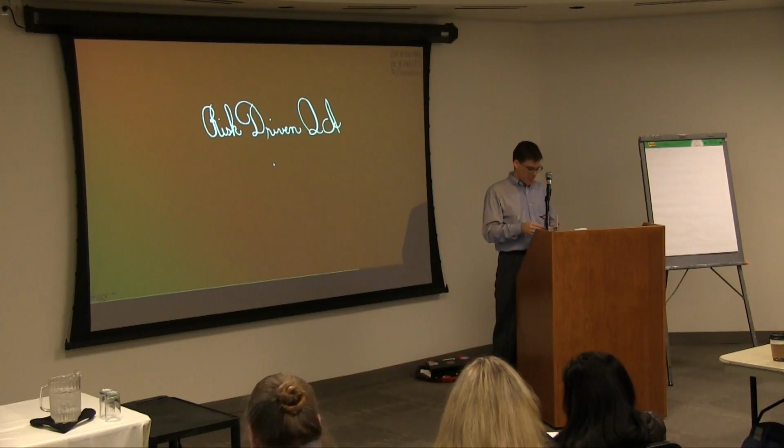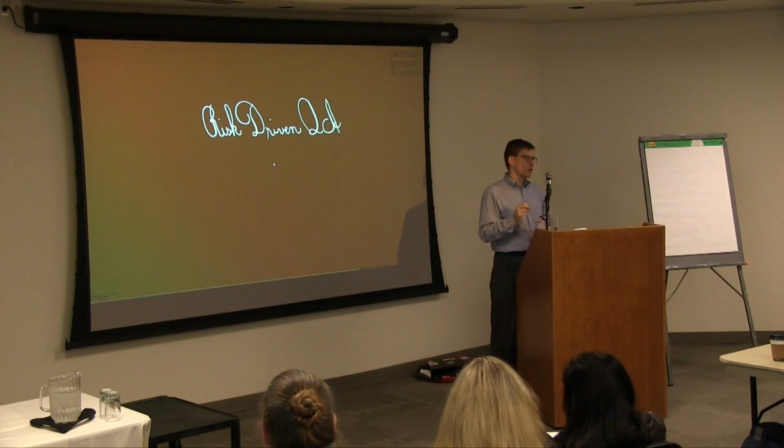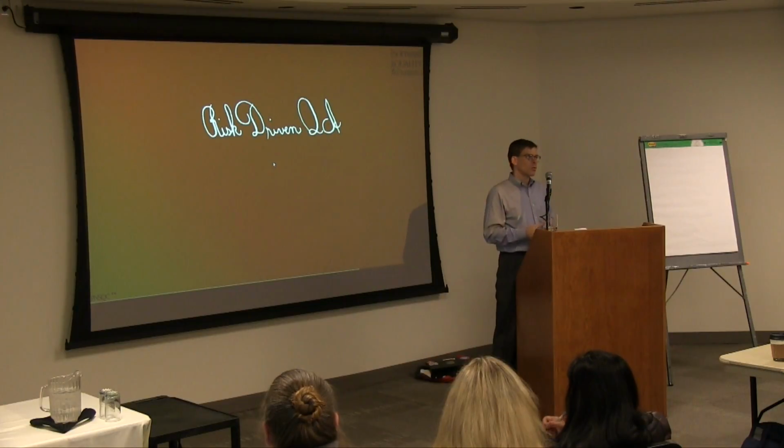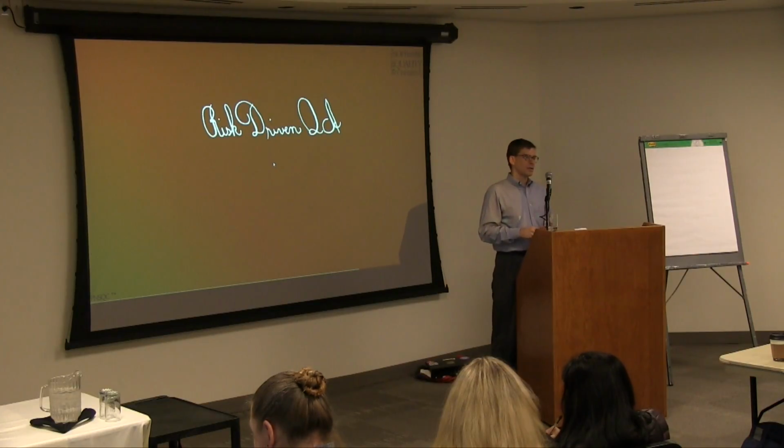On the low side, where we would determine that the risk was low enough that we would not engage at all, I'll give you a couple of examples. One would be a refactoring effort where the existing test suite should be adequate to cover any unforeseen modifications in behavior in the code base.